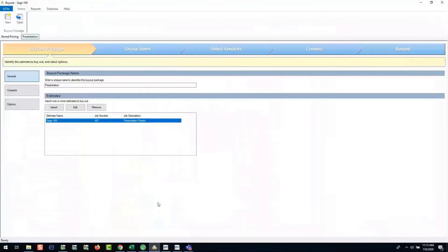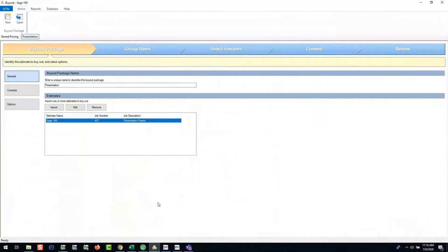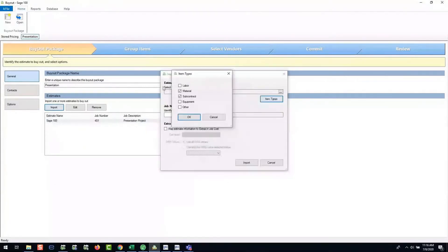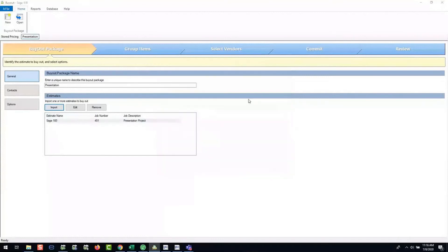Changing gears a little bit, we have a new solution that's just come out just recently. And it's called Buyout. And it does exactly what you would think it would do. It buys out the job, gives you the capability to send out requests for quotes to your suppliers, your subcontractors, your vendors, so on and so forth. We won't get into the details of this, but for today's purposes of today's presentation is looking at the integration point that we get from it. But I will give you at least a high-level walkthrough. So when you're looking at this, we import a job and we determine the types, the category types of information that we want to buy out. So if your labor pool, you're self-performing, your labor pool has been exhausted, I don't mean tired, you just don't have any available labor, then we might want to send that out to the street, see what we can do there. Or you may do that anyway within your normal process. Can the subcontractor do it cheaper than our self-performing labor? So it may happen. Well, at this point, we'll just say material and subcontract.